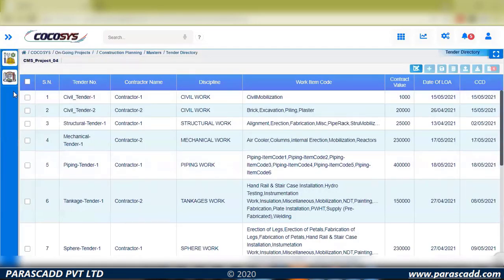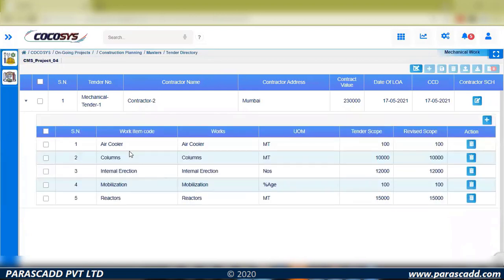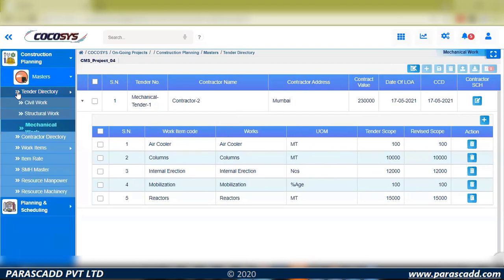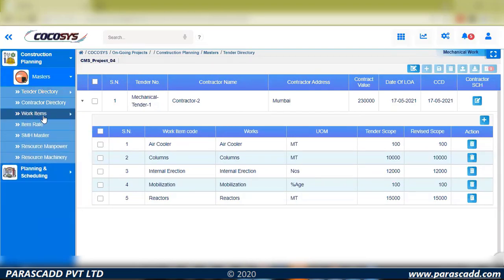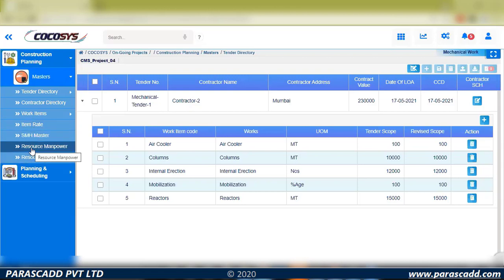For a specific mechanical-related tender, I have five work items with defined scope quantities. Once scope quantities are defined and work items are set, there is provision to maintain item rates. Standard man hours can come from the masters, item rates can be managed, and resources and machineries can be associated with items based on planning concepts. These provisions are being enabled.